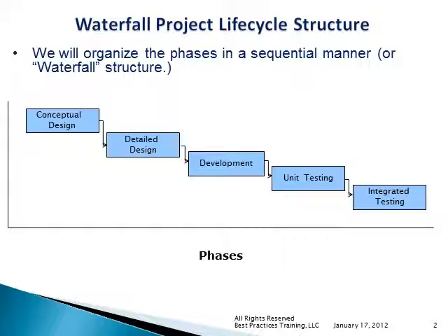You get that all nice and neat, you tie a bow around that, and you hand that off down to the next team, the programmers doing the development, writing the code. So they take your file layouts, they take your high-level specs of the different programs and their modules, and they write code against it, and they might take 6 months, they might take 9 months to write all their code. Get that ready, put it into unit testing. That might take a couple of months or a significant amount of time. Get that all nice and neat, and then we're ready to plug everything in together and do integrated testing, and of course that can take a couple of months.